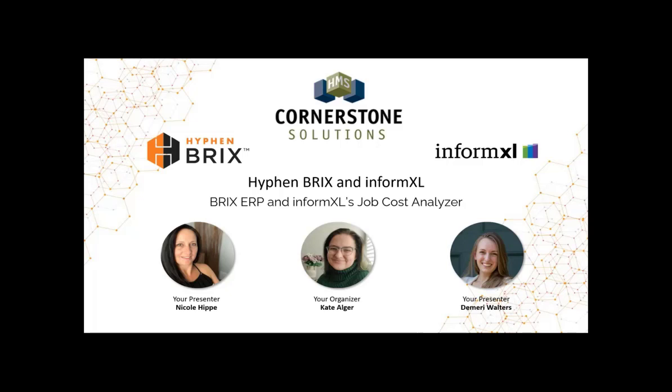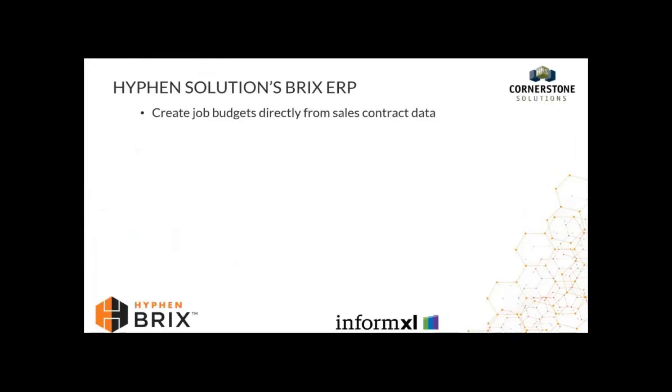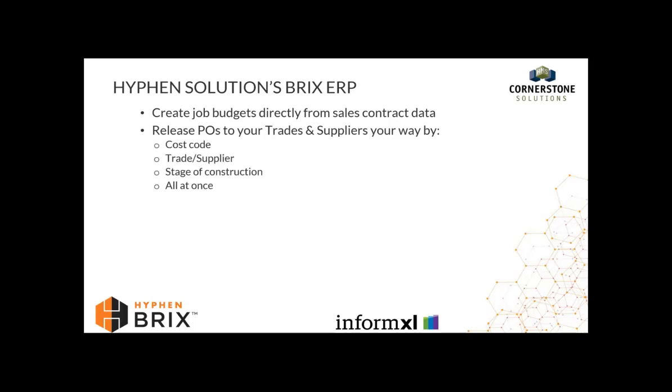So let's jump into the bricks solution here first of all. During the presentation today, on the bricks ERP side, we're going to go over creating your job budgets directly from your sales contract, so pulling all of that data in for you. And then releasing your purchase orders to the trades and suppliers your way. So you'll be able to release purchase orders if you wanted to by cost code, trade, supplier, stage of construction, or my preferred preference is all at once, but completely up to you how you want to release your purchase